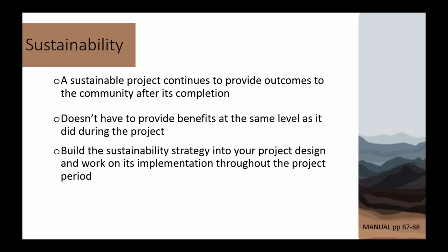Okay, moving on to the next element, it's about sustainability plans. Sustainability is defined by ANA as being able to continue the project's outcomes to the community after your project funding has been completed. So say your project was to write a language curriculum. Your project ends, and what ANA wants you to do is define how the benefits of that curriculum that you produced during the project are still going to remain in your community and continue to provide benefits to your community.